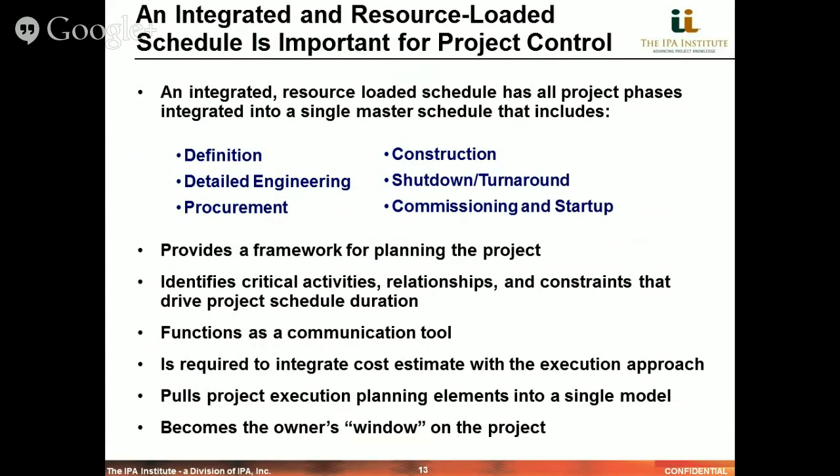And what we have found is that building an integrated resource-loaded schedule is a practice that is clearly correlated with better outcomes. And by an integrated schedule, we mean one that covers all the critical project phases: definition, detailed engineering, procurement, construction, when applicable, shutdown and turnaround, and in addition, the final commissioning and startup phase.